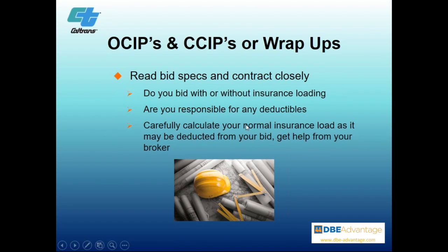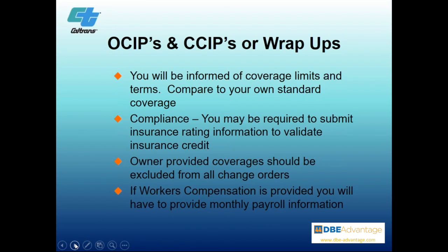and know where the contractor has responsibility and where the owners have it. And likewise, you as a sub or as a prime to a sub, you want to make sure where the division line is between you and subs, or you and primes. So stay very up on those for both the owner insurance programs as well as the contractors' insurance programs. You will have coverage limits and terms; compare them to your standard coverage. You may have sufficient coverage, you may not. You may have to increase it, but look at the limits, know where you are.